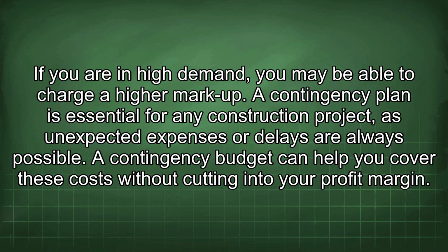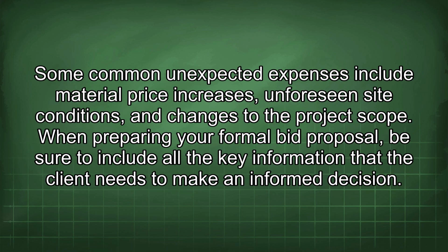A contingency plan is essential for any construction project, as unexpected expenses or delays are always possible. A contingency budget can help you cover these costs without cutting into your profit margin. Some common unexpected expenses include material price increases, unforeseen site conditions, and changes to the project scope.